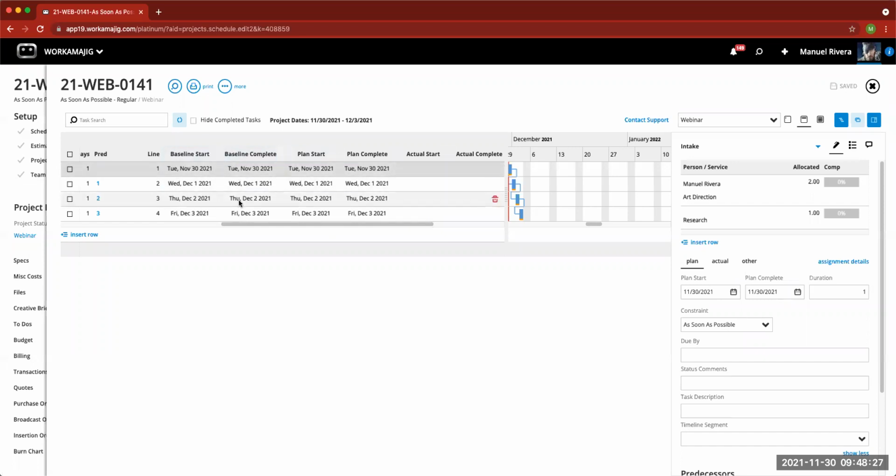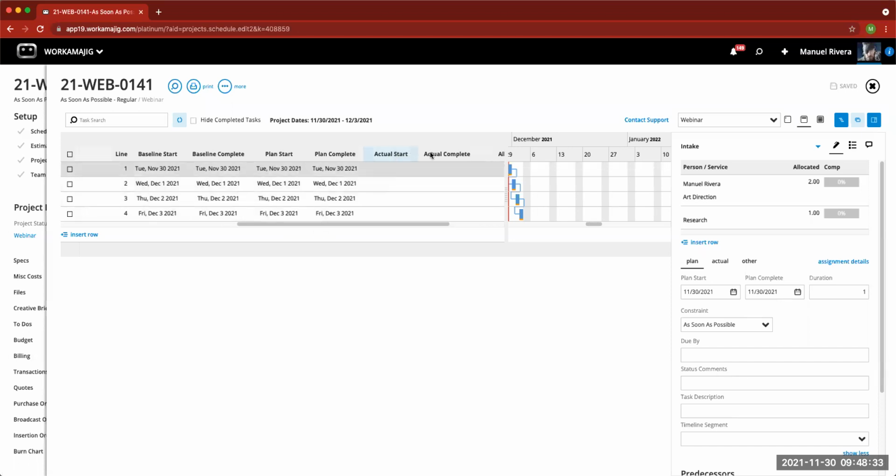Setting the baseline, okay? And then the other thing that you're going to see is that the system is going to then track actuals dates. And that's just going to allow the system to know, okay, this is when things actually happened. But at the same time, by the defaults, I'm going to ask the plan start dates to also update themselves because they're a representation that's linked back to your Gantt chart, right? So that starts to be correct, right? Okay, well, we started this late, so I got to show that we started late, which means that we got to push this next one, this next task later as well. So there's two things that you'll see, right, from that perspective.